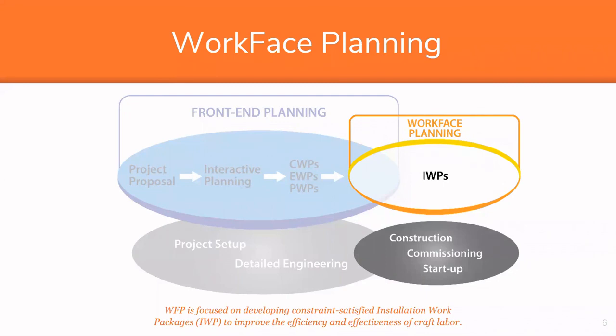Now, that model came out a number of years ago, and it did show some pretty good improvements. But one of the problems is when it comes to things like materials and engineering, if we don't have it when we need it, then it's very hard to be effective on site. So there's some work that needs to be done before we can WorkFace plan if we're going to get full benefit.